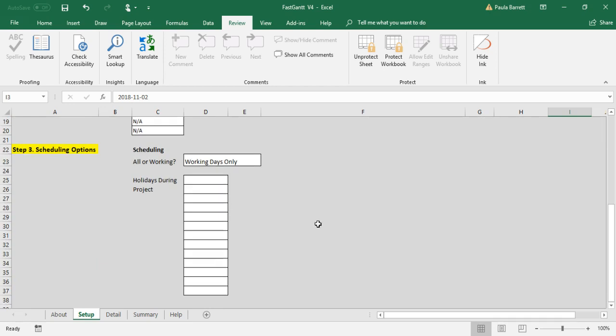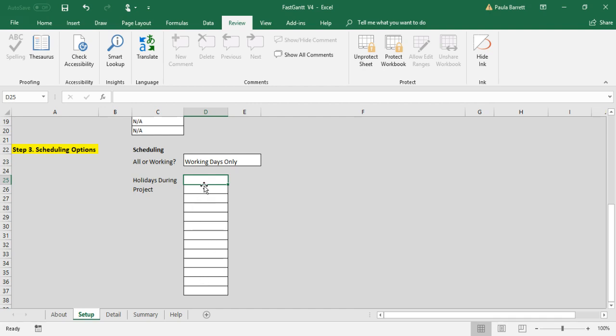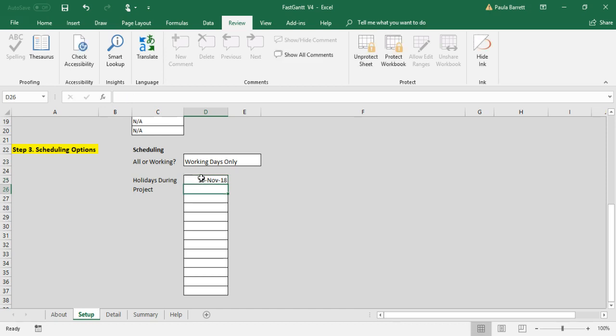Finally, step three is to tell FastGantt how you would like it to schedule. As you can see, it's set up right now for working days only, which means that the system will schedule work to be performed Monday to Friday, not Saturdays and Sundays, and not on any days that we indicate here. So if there's holidays that are during the project period, we could enter them there. For example, if November 15th was a holiday, you would put it in there and then work would not be scheduled if you were on working days only.